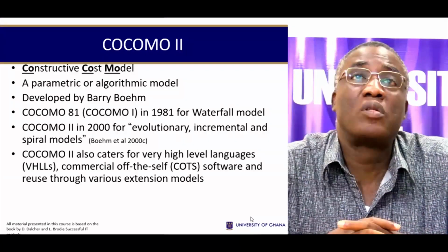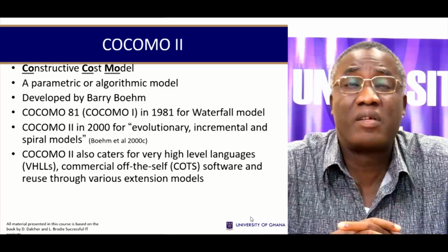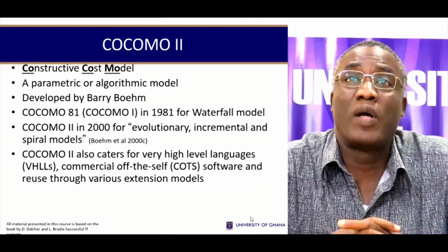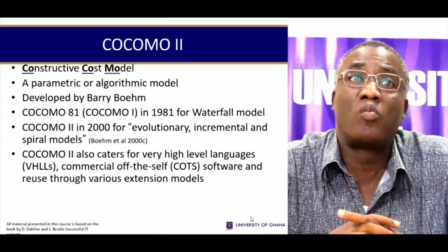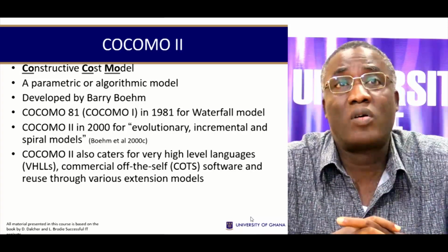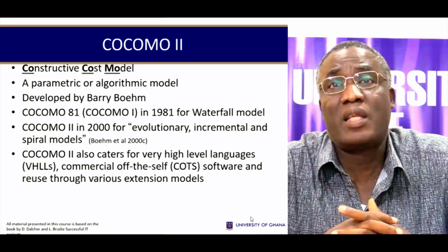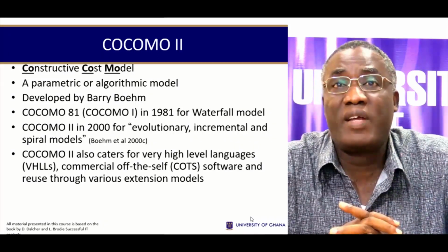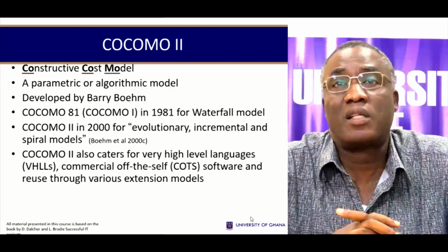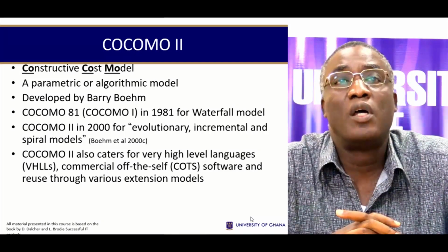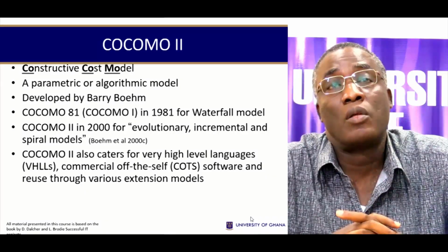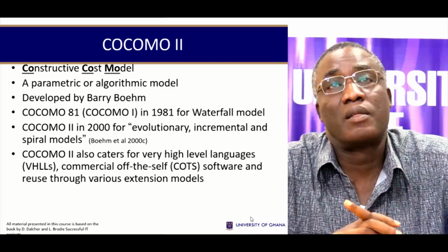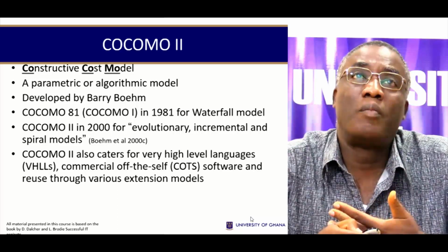The Constructive Cost Model, or COCOMO, is a parametric or algorithmic model, again developed by Boehm in 1981 for the waterfall model. COCOMO II came about in 2000, and it was seen as catering for evolutionary, incremental and spiral models. It also caters for very high-level languages, commercial off-the-shelf costs, software, and reuse through various extension models. So it's something that you need to read about to understand what this is. You may not require to use it now, but at least be aware of it.